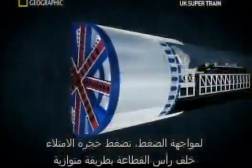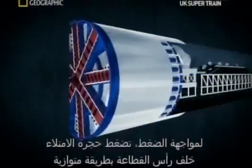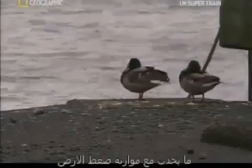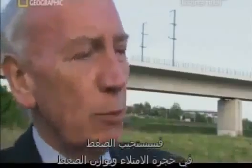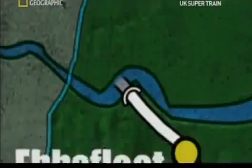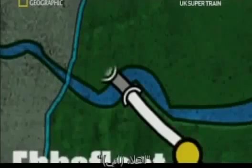To counteract the pressure, the plenum behind the cutter head is equally pressurized. It's called an earth pressure balance system. And what happens with the earth pressure balancing is that if there was a sudden inflow of water during the tunnel operation, the pressurization in the plenum would respond and balance out the pressure. Thanks to the pressurized plenum, crews bore ahead without a single breach.